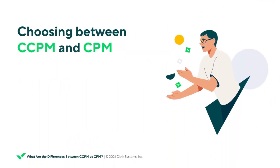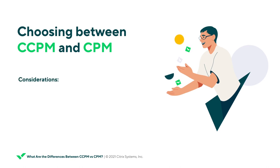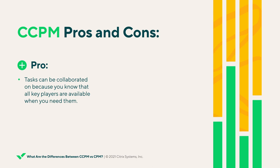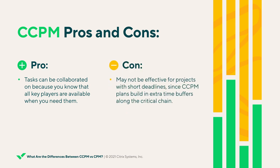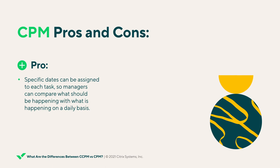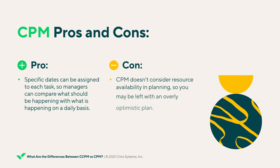So when should you choose CPM or CCPM? There are two main considerations: flexibility and resource availability. CCPM is a better choice when there is flexibility in the start and/or end dates of activities and when there is a guarantee of resources — staff, equipment, or space. CCPM is not a good choice for projects with short deadlines, since CCPM requires that time is added to the schedule. CPM, on the other hand, is better for projects with short deadlines because it relies on more rigid scheduling and assumes resources will be available. However, that means CPM can sometimes result in overly optimistic planning.